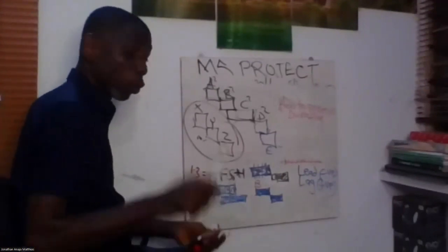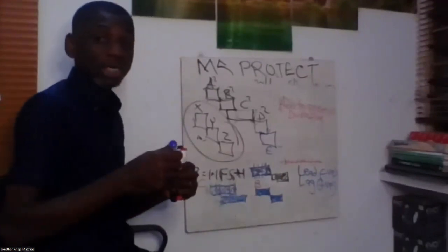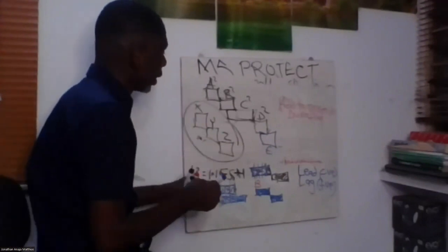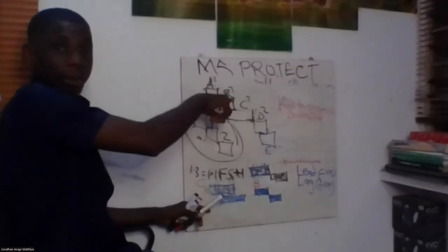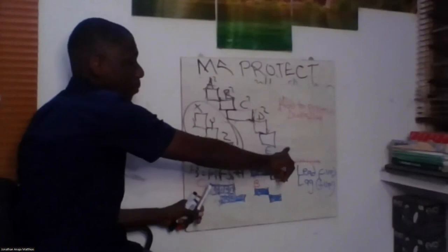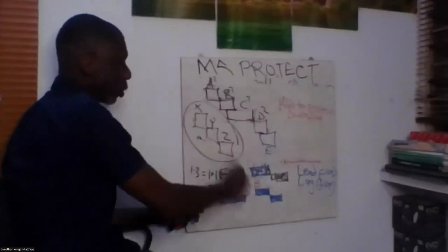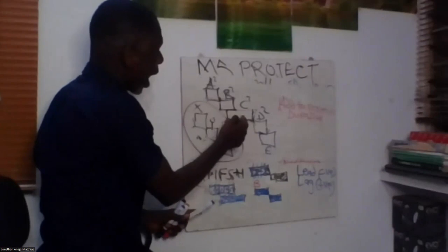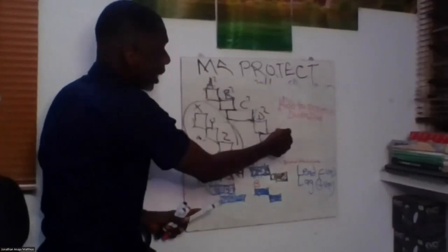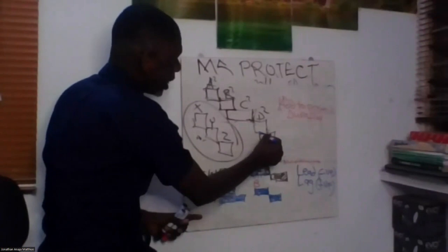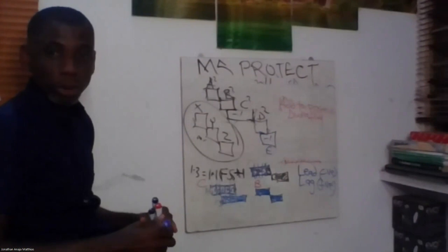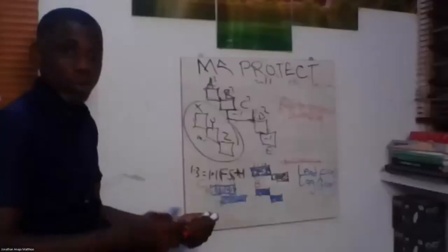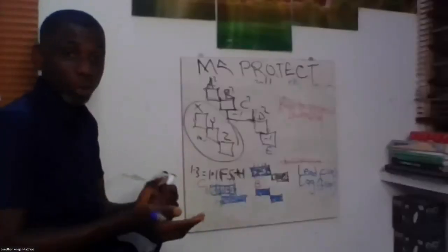Let me just explain that float or slack principle. Whether you're using float or slack is the same word, right? Now, if I want to apply a lag here, let's look at this first path, the critical path, and the non-critical path. Let's say I have 10 days before. I have applied lead here. I have gained 2 days. It has taken me to 8 days, right? I have saved 2 days. So from 10 days, I have reduced my project duration to 8 days.